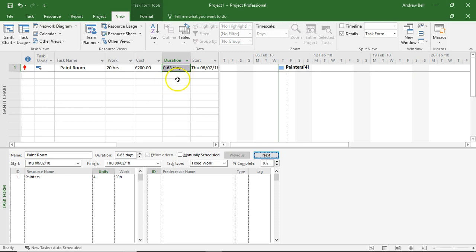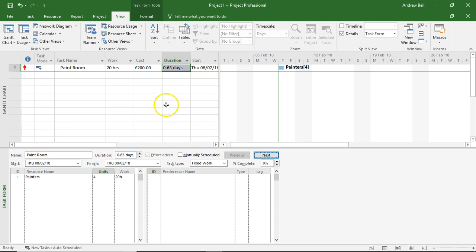It should be taking about six hours or so. But that assumes that I've got four sets of paintbrushes, four sets of paint pots, four sets of ladders.